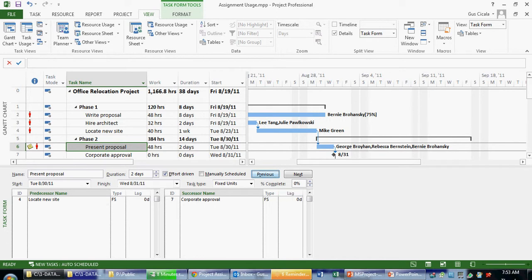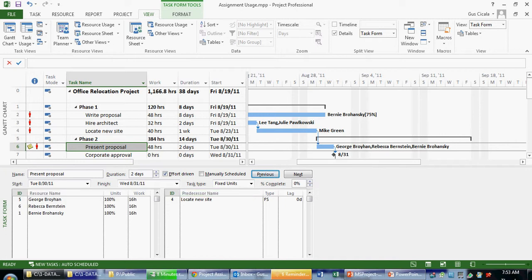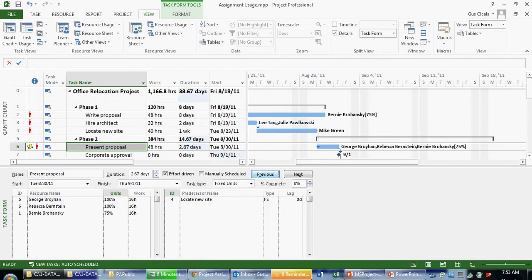The same is true when I look at resource-based information. So if I'm looking at, for example, resources and predecessors, I can manipulate the units here. I can make this 75% if I wish and click OK. And that then gets applied to the task, which increases the duration. So this view is useful to give me information about a task, but it's also useful to actually manipulate information about a task.